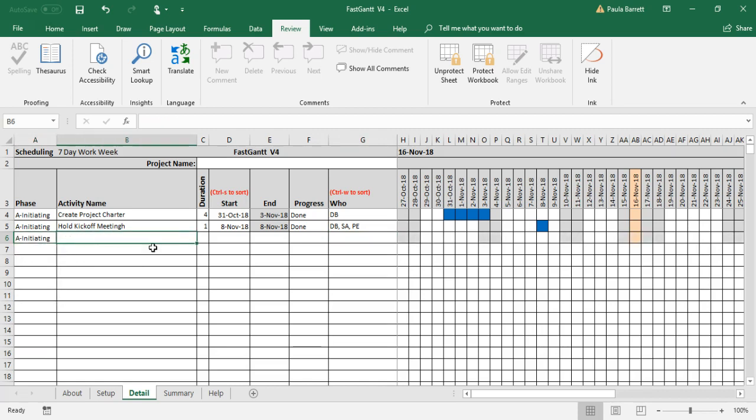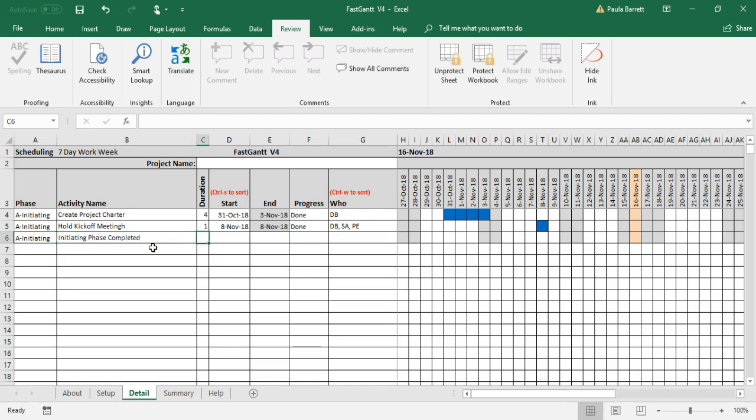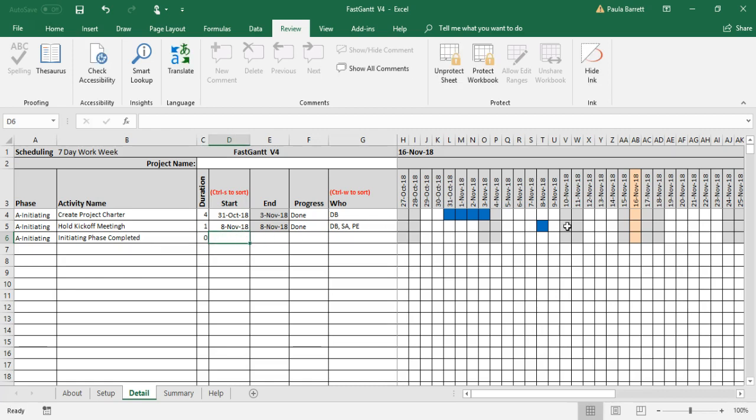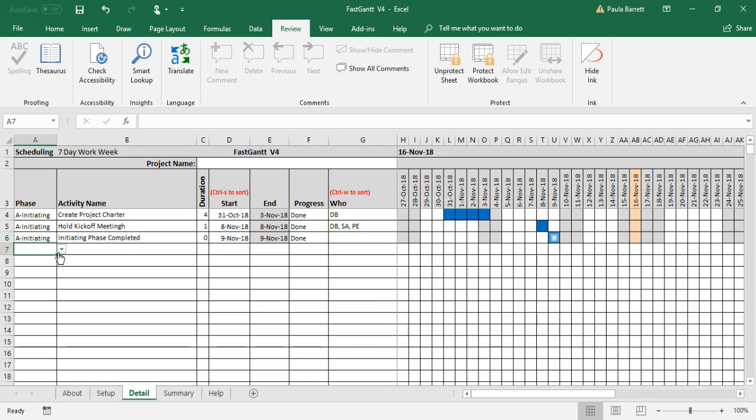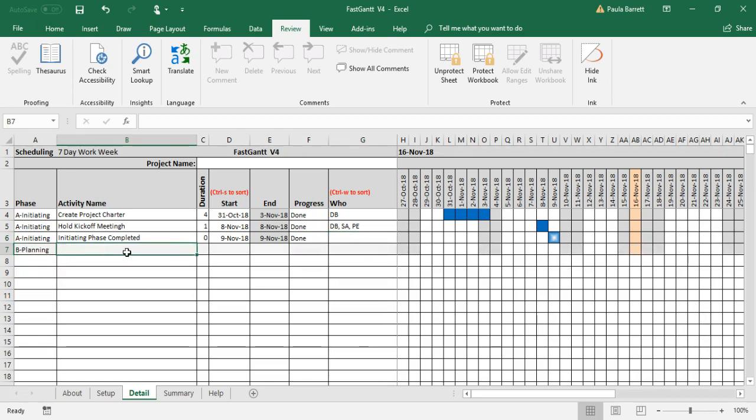So now we could say at this point, initiating phase is complete. And we're going to do something special here. We're going to say that this is a milestone. A milestone has a duration of zero days. And we'll say that once we're done these tasks, so in effect, once they're all complete, so as of November 9th, we have our milestone is complete. And that shows up as blue with a little star in it. So that indicates a milestone.